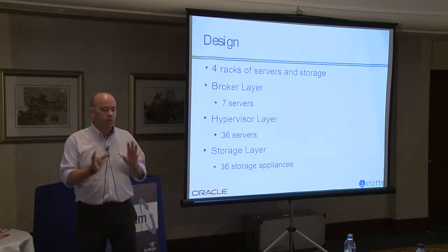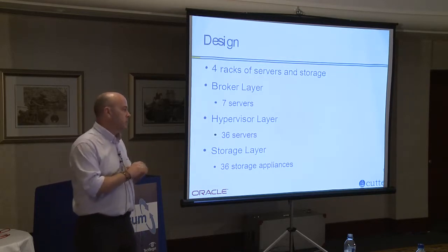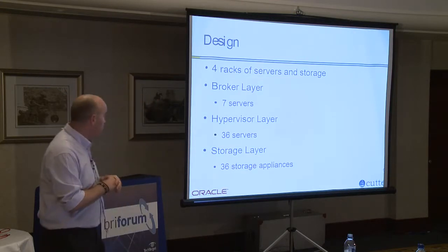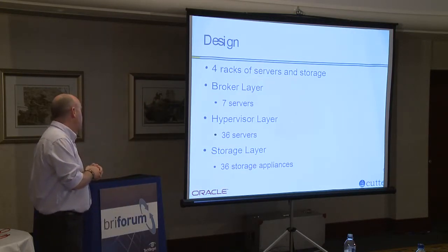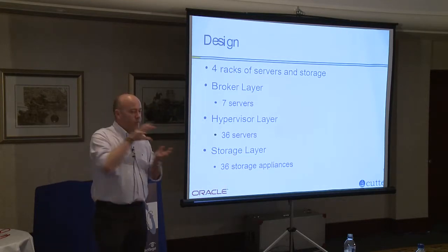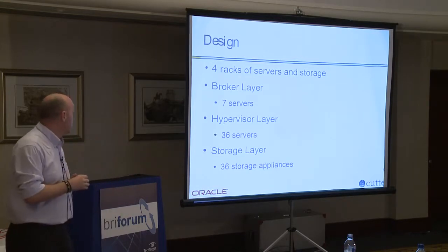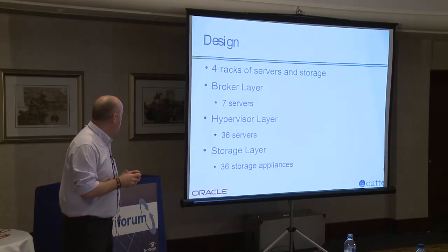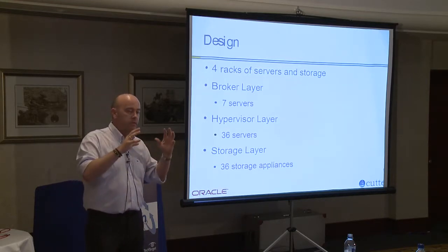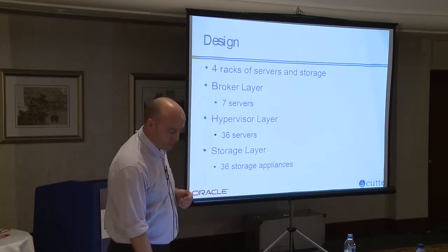This is where the design was put together like this because of the Lego brick model required by the council, being able to pick up units of 100 and deploy them. They'll actually take around 150 desktops, possibly even more, depending on how well you've optimized your Windows templates. But we've built it with 1 storage, 1 server, 1 storage, 1 server, so they know the expansion model. We could have combined those into larger 7300 series, 7400 series server and storage devices with multiple trays of disks, but it's not what the council wanted at the time.